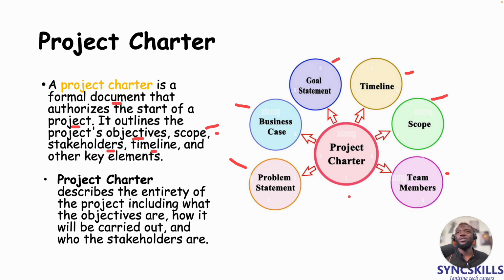So in a typical case of building a website, you need to define why we are building a website. It might be to drive more engagement, more brand visibility, to be able to sell more to your customers, and a lot of factors can impact you initiating a project to develop a website, and you know that you need approval in terms of business case. How much are we going to spend? Does it make sense to build this website? Do we need to contract it or build it now? So all of these important considerations can be found in a project charter.